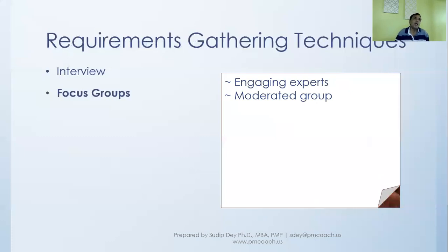Moderated meaning when you have that kind of discussion, focus group discussion, you have to ensure that everyone in the discussion, different experts, can provide their inputs, can provide their expertise, and it should not be that one person is dominating the whole discussion. Then you will lose out, because you have not collected or gathered input from many of the other experts that you have sought to gather inputs from. Now, focus group discussions, when we have this kind of discussion, it's an interactive discussion.